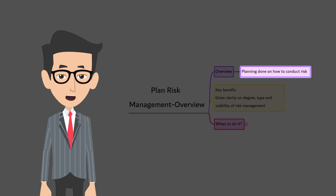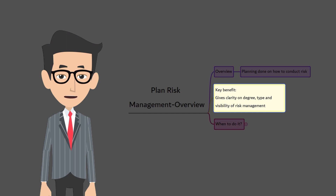As a part of the planning, the potential areas of risk in the project are identified by the project participants. This process also identifies who will be involved and how the team will go about performing risk management. The key benefit of this process is that it gives clarity on degree, type, and visibility of risk management to stakeholders.